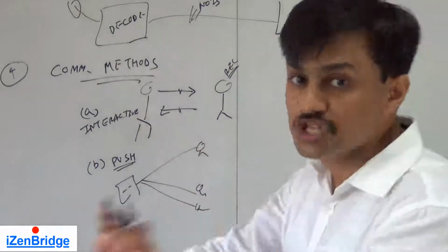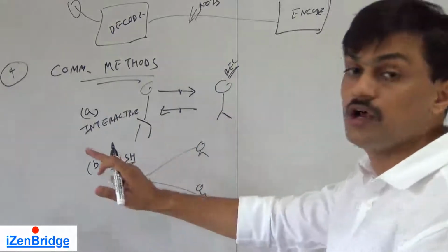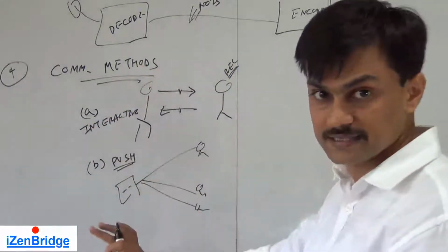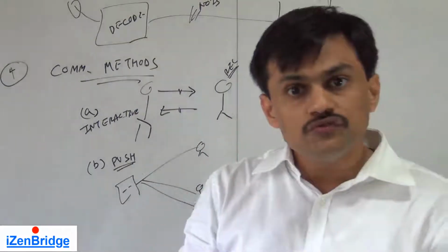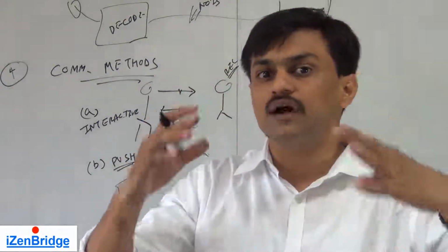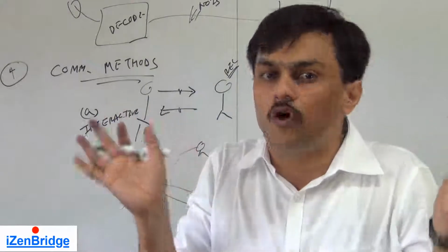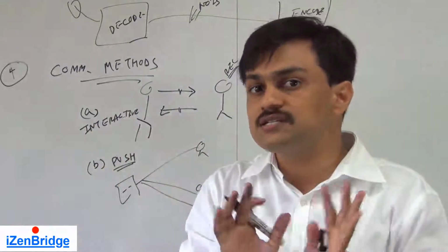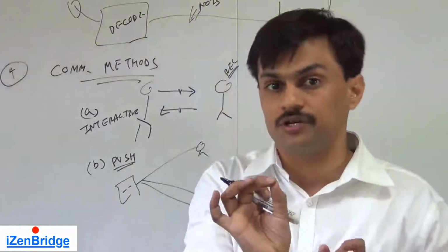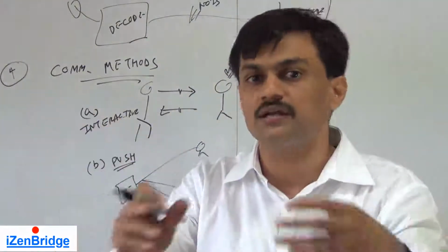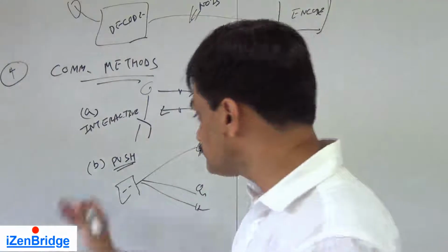You are just pushing the information. You are not making sure, you are not asking for feedback. So this communication model will work for project status information where you have to satisfy the stakeholders who just need to be informed, or stakeholders who are just interested in knowing the progress or timeline related information. So you can just push the information at a regular frequency.